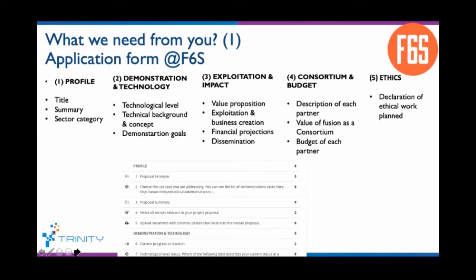Of course, in terms of budget, it needs to be eligible and broken down by cost. You should probably already know that you will be paid in lump sums, against deliverables that you submit to us, to the TRINITY project, to Mina. So you really have to make a plan, a work plan, already at this stage.